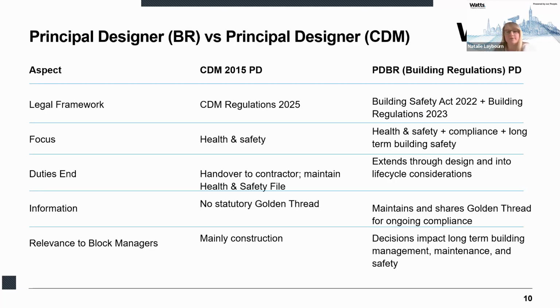A key change introduced by the Building Safety Act is the concept of the golden thread: maintaining accurate, accessible and up-to-date records of safety critical design information. While the formal legal requirement to maintain a golden thread applies to high-risk buildings, the same principles of good information management and traceability are encouraged for all building projects.